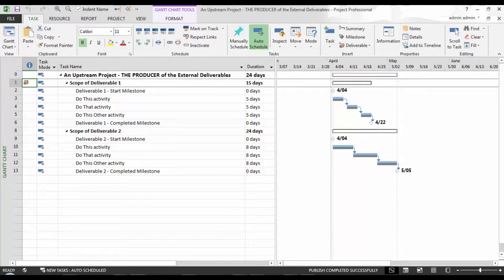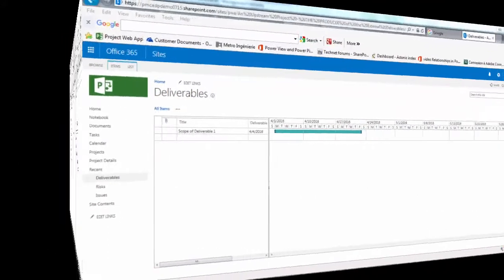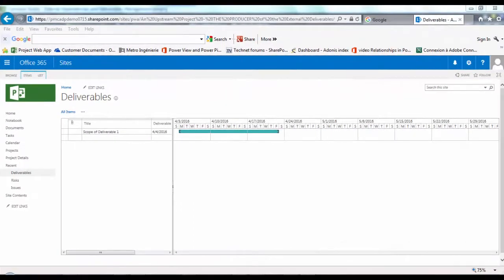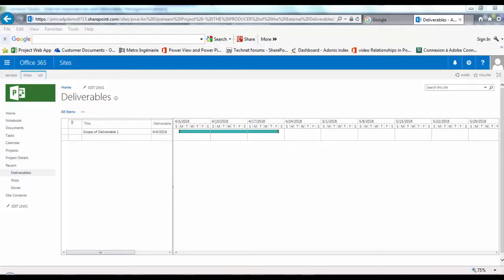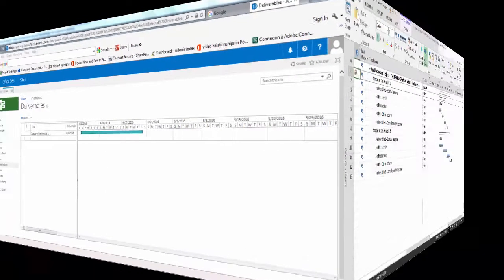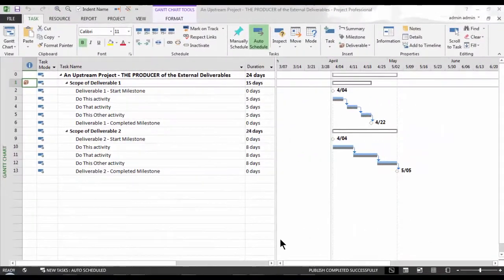Note, to perform this operation, the project file must first be published so that it has a project site to host and list the deliverables for this project. Let's flip over to the Project Web Access, also known as PWA, and take a look at our Producers Files Project Site Deliverables page. And here it is, laid out in a similar fashion to what we had in Microsoft Project Pro. If you are new to the notion of Project Sites, I cover the purpose of Project Sites near the end of my Demand Management video if you're interested in learning more.